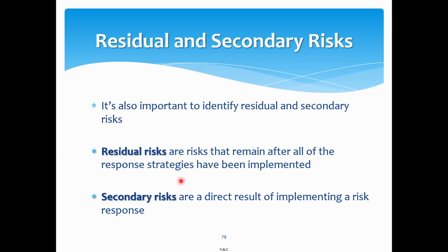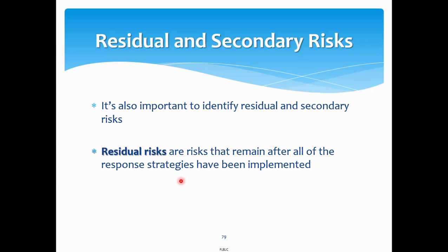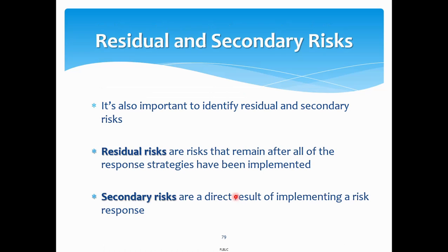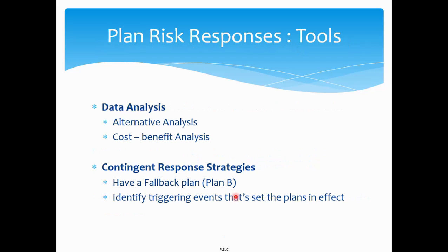In performing the actions for your risk, first you will have to draw this, and your center of attention will be this arrow. Once you take the actions against the risks, as a project manager, you will understand that no matter how many actions you take, there can be a residual risk involved, a balance risk there. And then sometimes your actions might trigger another risk.